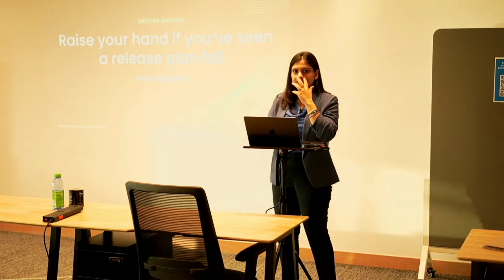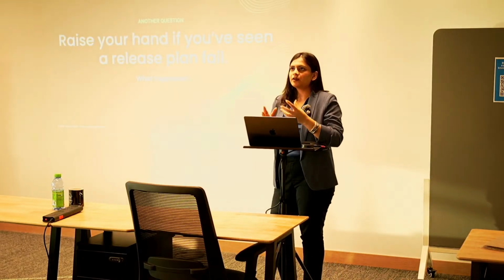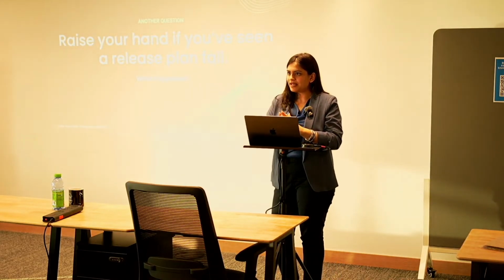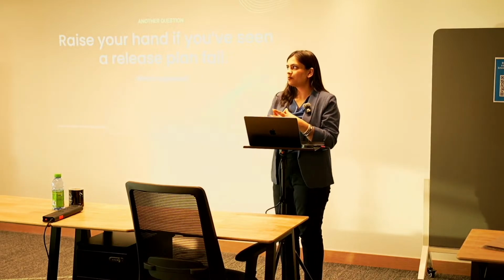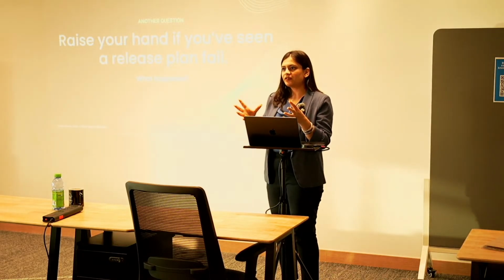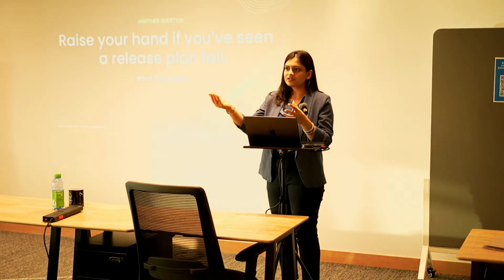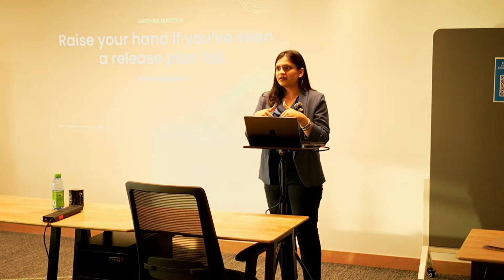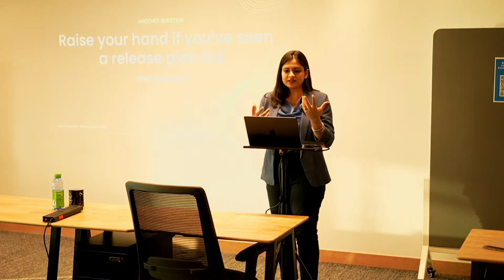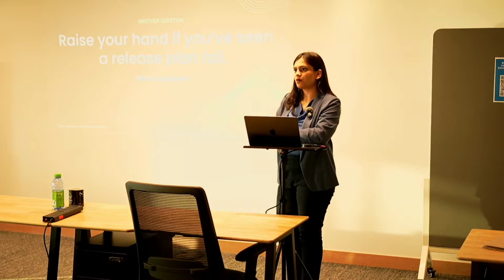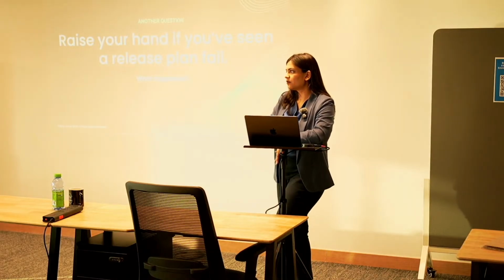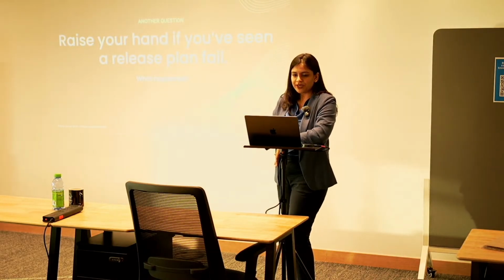That's an uncertainty which we might know at the start of the planning, but there are times when we assume that it's going to work out and we move on. But it's really important to bake in some sort of buffer in the plan if we know that there might be an unforeseen uncertainty that might get introduced. Then there's always that buffer that you consider in the plan. That's not something that we will talk about in detail, but really good point brought up by you.